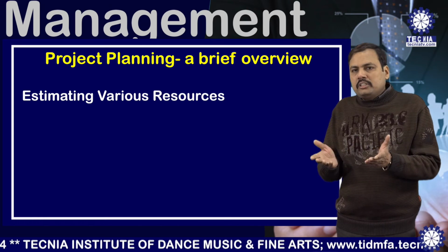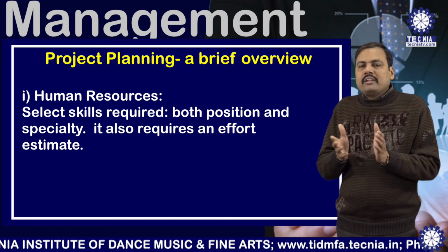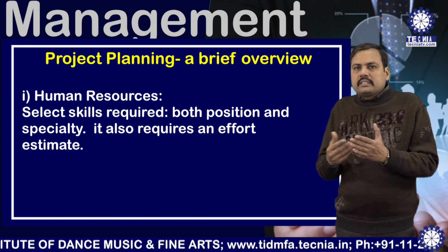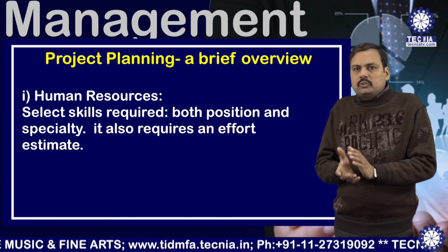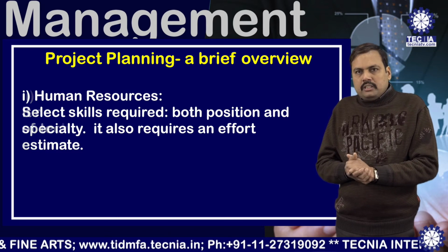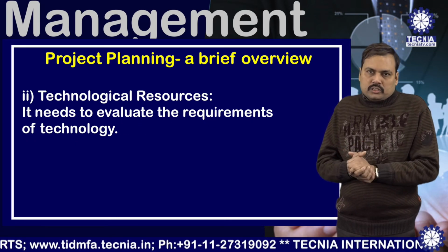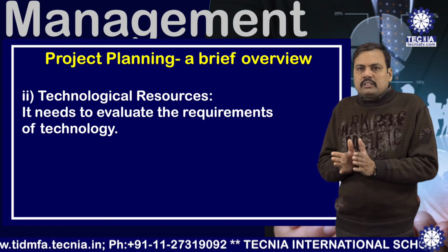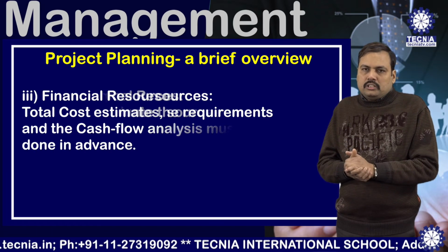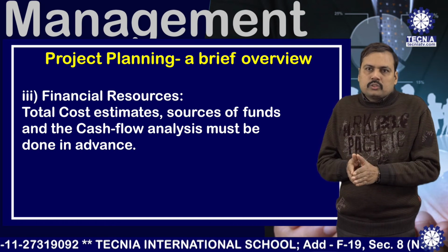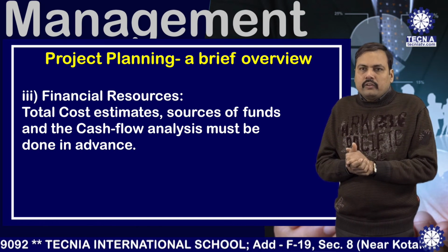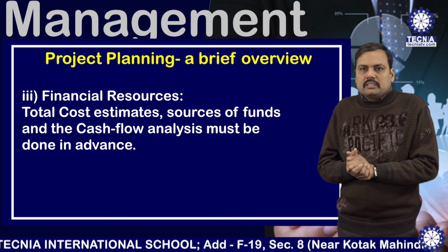Next is estimating various resources. Human resources. Select skills required, both position and speciality. It also requires an effort estimate. Next is technological resources. It needs to evaluate the requirements of technology. Next is financial resources. Total cost estimates, sources of funds and the cash flow analysis must be done in advance.